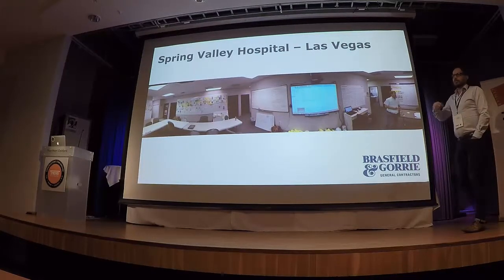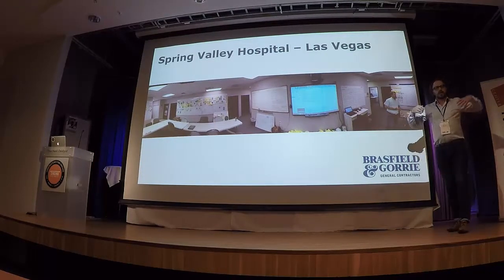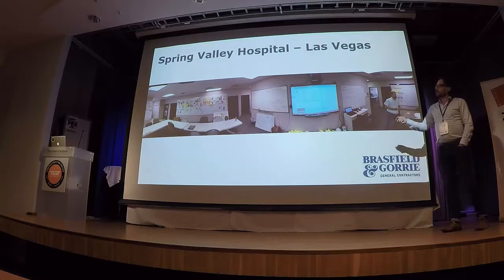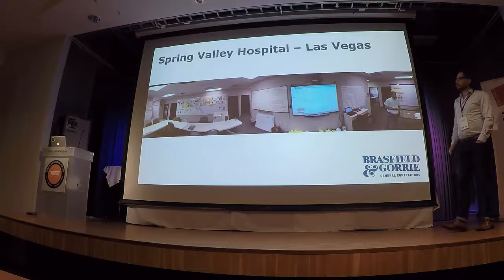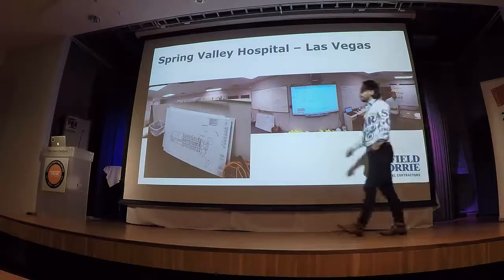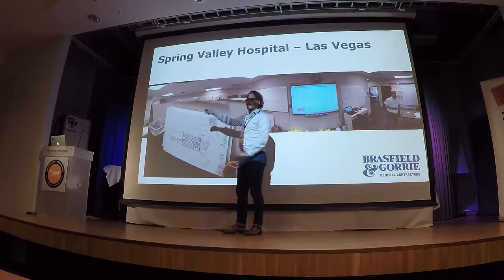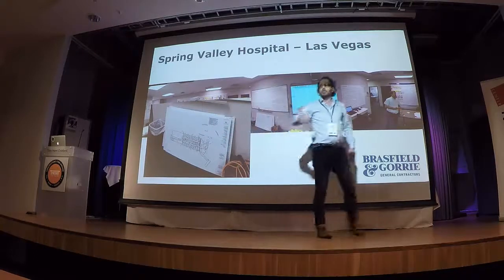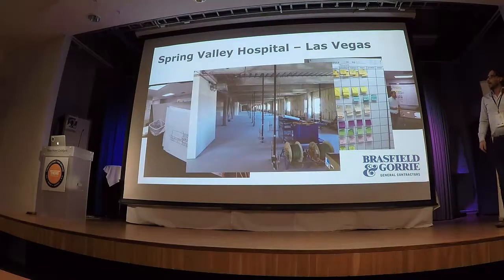One of the members of our group walked into this room and said, this is actually immersing into the plan, to dive into the plan, standing in the room. So you have a look-ahead schedule over here, and you have a weekly plan at the other side of the room. Very low tech. They even have cardboards of drawings to draw on, to explain in more detail. They have these sticky notes, everything analog. I've never seen a site like this. This is a picture that we took on site. It looks like it's deserted.